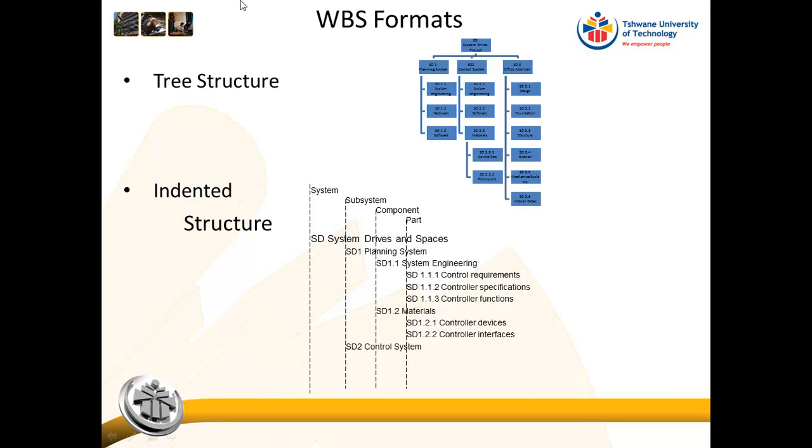As in any discipline, project management has jargon. Now, one of the jargons in project management is that when we look at a work breakdown structure, if there is a block at the top and there are lines that connect to that block, what you are telling me is that by doing these three activities over here, I will have the top activity.